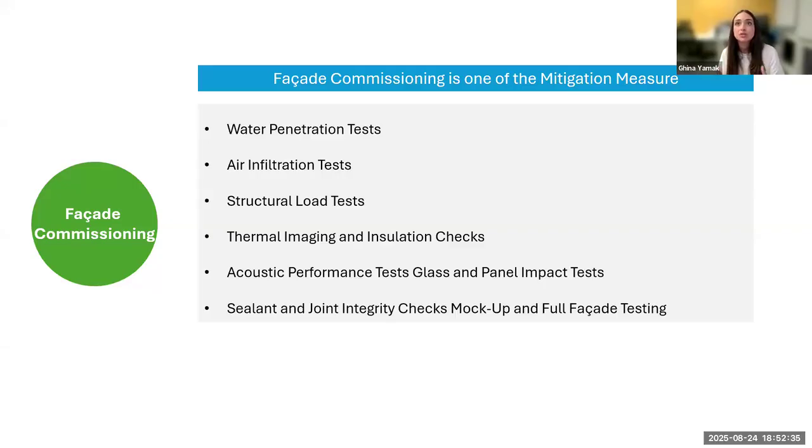And the acoustic performance, maybe not everyone would be very mindful of acoustic, but acoustic is very, very important in a building. The sealant and the joint integrity, and so on. So this is where a team will go on site and start testing your curtain wall, your opaque facade and cladding, if everything is going well, yes or no, and if what you've designed a year back is actually functioning now. And this is where we say, it's the moment of truth.